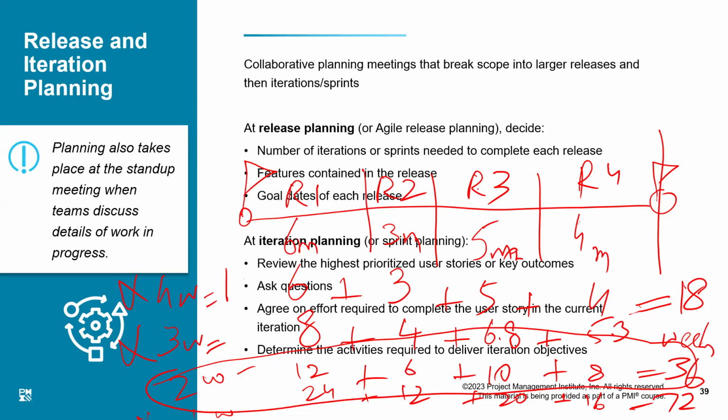This decision is made once. It cannot be changed. When the agile project starts, if the decision is to have an iteration of 2 weeks, then it should be 2 weeks. Well, actually, I should not have any objection to 4 weeks also, because that is also doable.